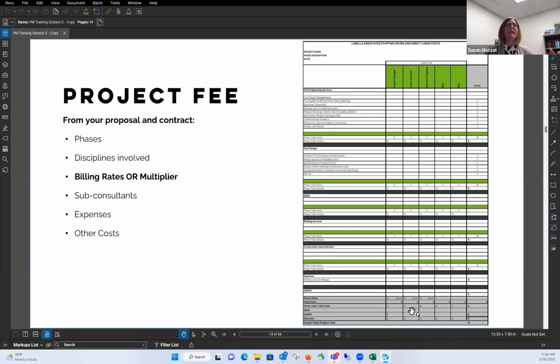And then expenses and other costs. We had to travel to the site. The site's 2 hours away, and the client asked us to be there many more times than what was in the original proposal. I was watching those things, or letting people know that in our proposal, we only had 5 trips to the site. So when you're going there, make sure you capture as much as you can, because you're going to be limited in the number of trips you can make.